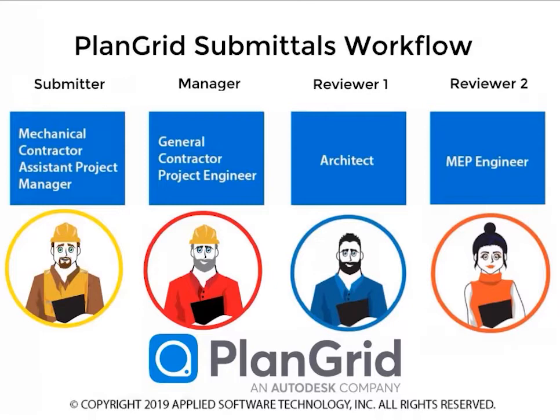Today, our submitter will be the mechanical contractor assistant project manager. The manager will be the general contractor's project engineer. The reviewers will be the MEP engineer and the architect. And then finally, the manager, the project engineer.